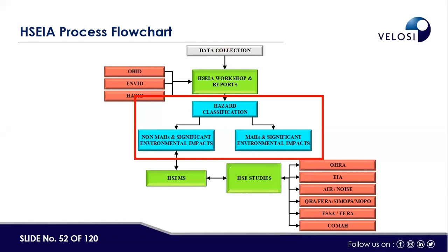Once we carry out the HSEIA workshop, we classify hazards as non-MAH and non-significant environmental impacts (managed through HSEMS) and MAH and significant environmental impacts (further assessed through OHRA, EIA, and COMA). All major and significant environmental impacts need further assessment through studies like OHRA, EIA, and COMA — which will be explained in the upcoming slides.